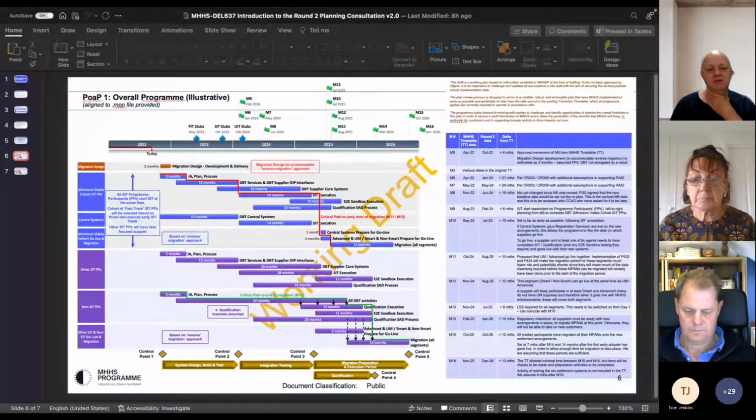So yes, obviously it's on the critical path, registration systems, and we need those in to be able to do SIT, to be able to do component integration testing. So you're right, Jenny, that we need to articulate that more clearly in the plan, and it's really building in the plans as you are building them up, so that we can demonstrate that.